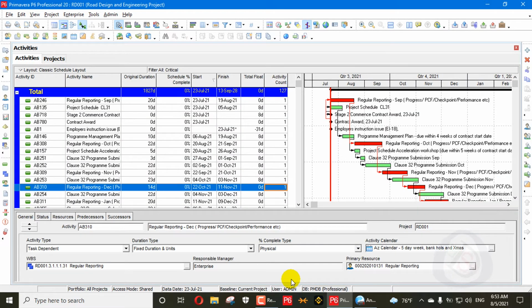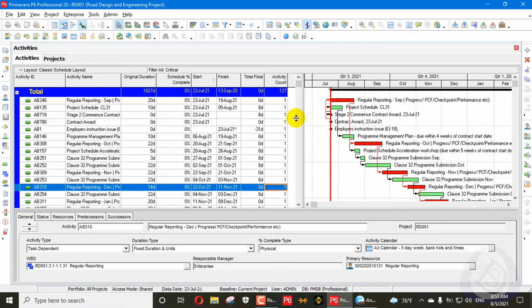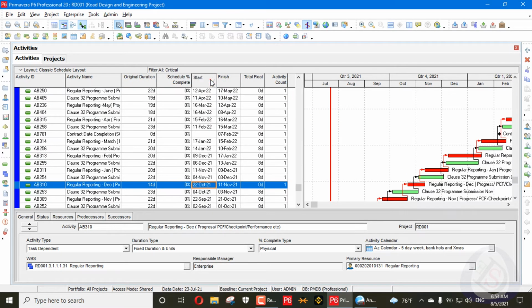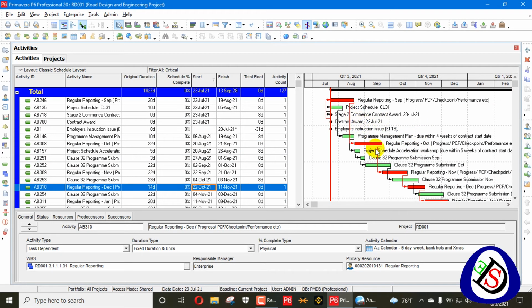Both these settings collaborate with each other. So the first thing we have learned is that if you change your float from here, it will also change the project level setting. I have also shown you the difference between how you can calculate your critical path by different methods by changing float. You can see here the activities having a float less than 0 are also showing, because